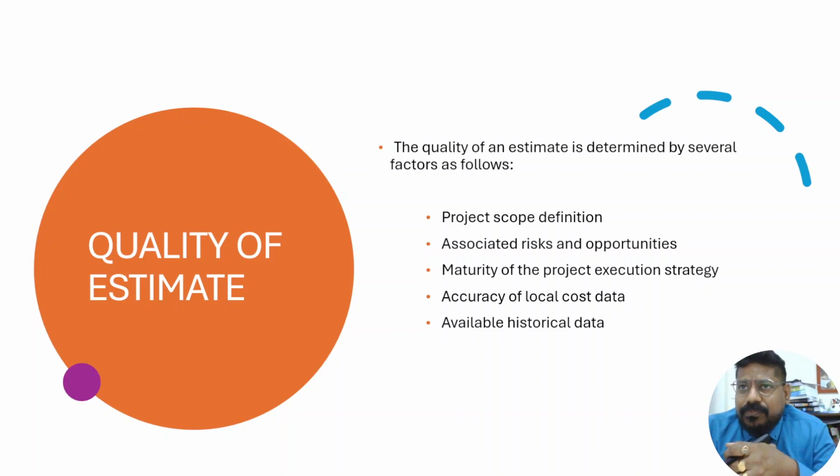Yes, it has to be of a refined quality, otherwise the purpose of the job will not be met. If the estimation is not of quality, or if there's a huge difference, 15-20%, I think 15-20% is also high. It should be less than 10 in your estimation. Your actual cost as opposed to what you have estimated should be somewhere between 8 to 10.